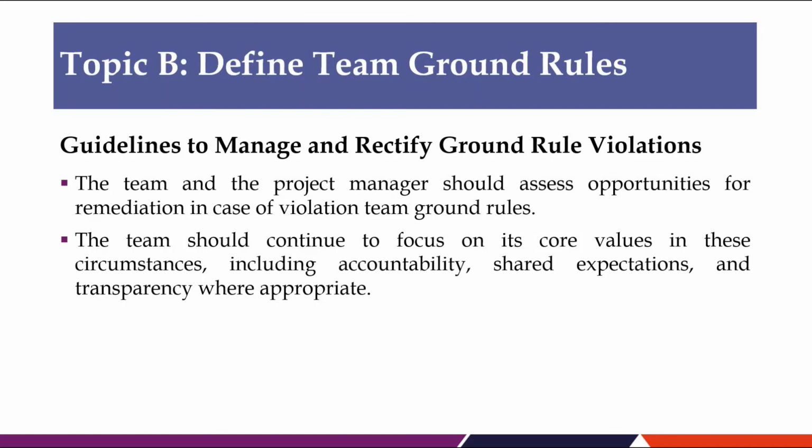When the team establishes its charter, it sets expectations for the ground rules about how the team is to operate and what methods will be used to handle conflicts that occur. If there are violations of the team's ground rules, the team and the project manager should assess opportunities for remediation, or whether the violation is so serious as to contemplate the removal and replacement of an offending team member. The team should continue to focus on its core values in these circumstances, including accountability, shared expectations, and transparency where appropriate.